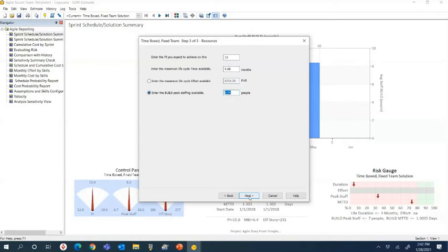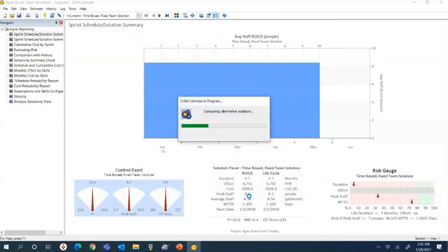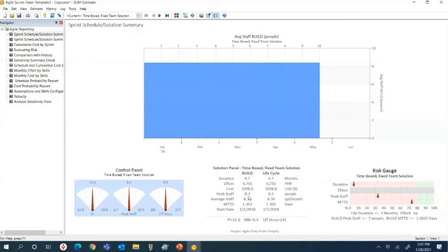And then I'm going to go ahead and run this one, finish, and then it runs the models, generates the estimates, and brings us back to this analysis area where we can negotiate. Okay, and again, 10 sprints, 4.7 months, 6,700 person hours of effort, and $1 million budget. And then also, we can look at trade-offs, right? That risk trade-off analysis that I mentioned.